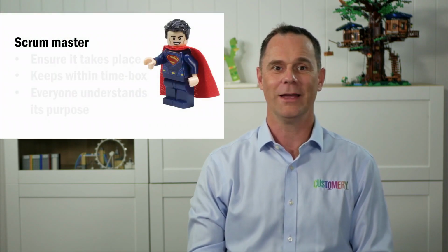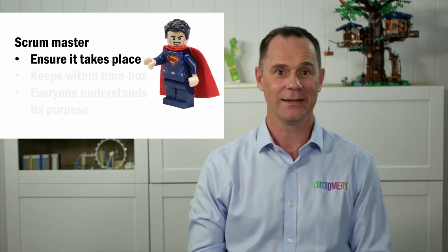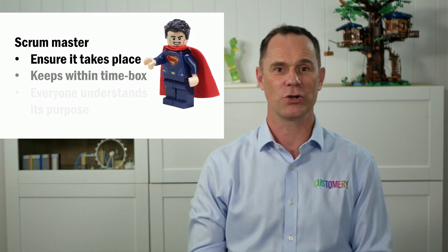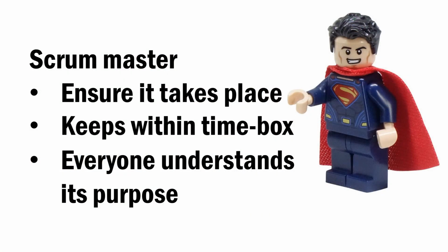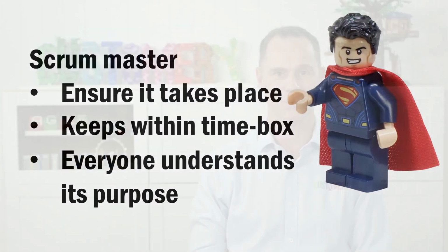The Scrum Master's role in the sprint review is very simple. Ensure that the sprint review takes place at the end of every sprint, make sure that the sprint review stays within its time box, and that everyone understands the purpose of the sprint review.